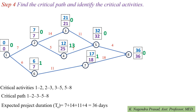The fourth step is to find the critical path and identify critical activities. A critical activity is any activity where the total float equals 0. Here, the critical activities are: 1 to 2 (total float 0 at both events), 2 to 3 (total float 0 at events 2 and 3), 3 to 5 (total float 0 at events 3 and 5), and 5 to 8 (total float 0 at events 5 and 8).